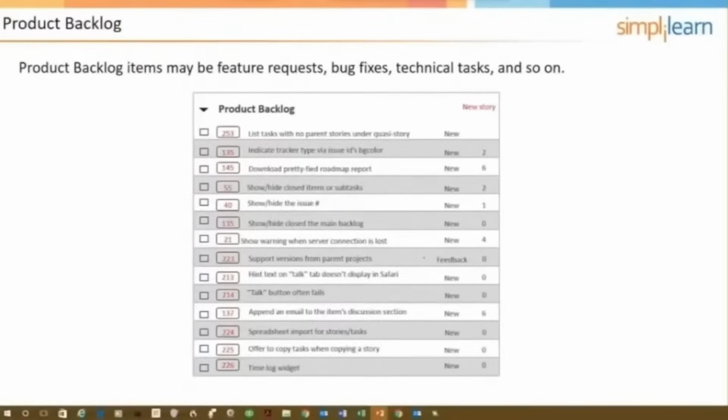That's a given. Does the product owner create all the user stories for the product backlog in isolation? No, absolutely not, because there are technical considerations that the product owner might not even consider. The product owner's perspective is more the customer side, the end user side. And so the product owner might not even think of things like security or architecture related things. And there might even be user stories that come from the technical domain that need to be developed before some of the product owner's user stories.